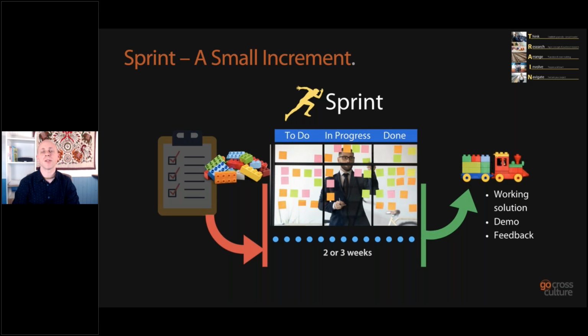customer to have an experience. You might say, actually, we won't put payment in there. We'll just put a search, we'll put add to a basket, we'll be able to place an order. And you might say that as part of the order, the telephone number of the customer will be there. So we'll telephone the customer and take payment over the phone. That's also a valid option. So it's very much dependent on what the product owner wants to do and where the business is going. So there's different ways of doing things. And that's an example of potentially a working solution.